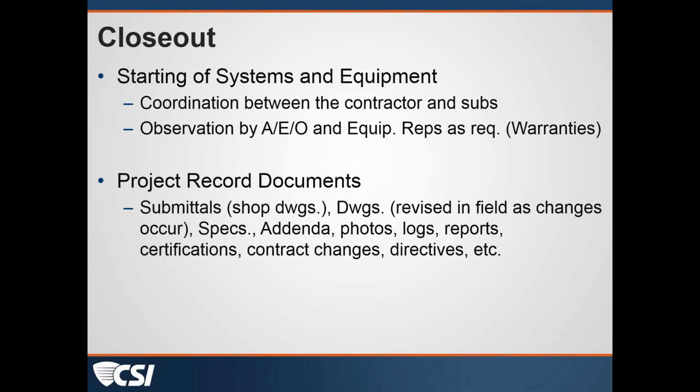My tip to try to alleviate some of that is, on a regular basis, and I typically try to do it on a monthly basis at the monthly OAC meetings, look through the contractor's record drawings. Make sure he keeps them on site, thumb through them after the meeting or before the meeting, make sure that he is marking those things up as the project is moving along, and make sure that he's got all his subs marking them up in that same set.